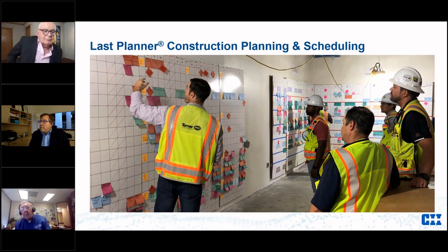And every week, every Monday, we sit down and say, just like you did, what did we do? What were we going to do last week? What did we actually do? What's coming up in the next 2 weeks? Are we on board? Do we have everything we need to do that, or do we need to take some extra steps to get you what you need so that you'll be able to make that commitment? And that works very well.